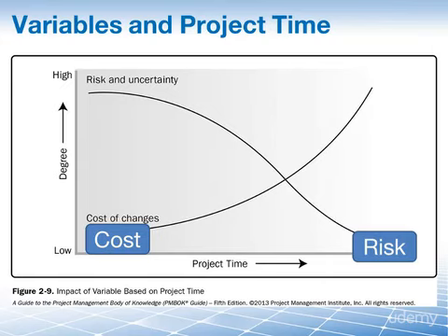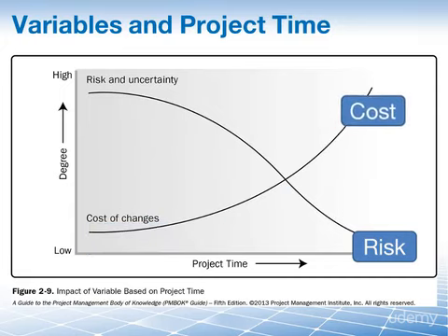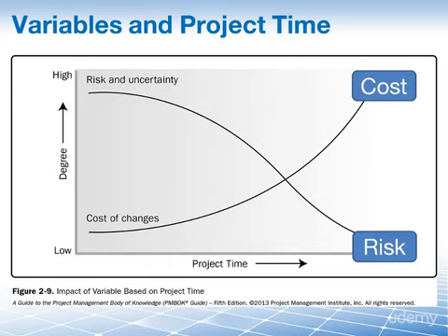During the start of the project, the project manager has an unparalleled opportunity to make the appropriate changes to the project plan and project deliverables that the project is planned to produce. However, the cost of correcting errors, of making changes, or going into a new direction keeps skyrocketing as you go further and further along the project's timeline.